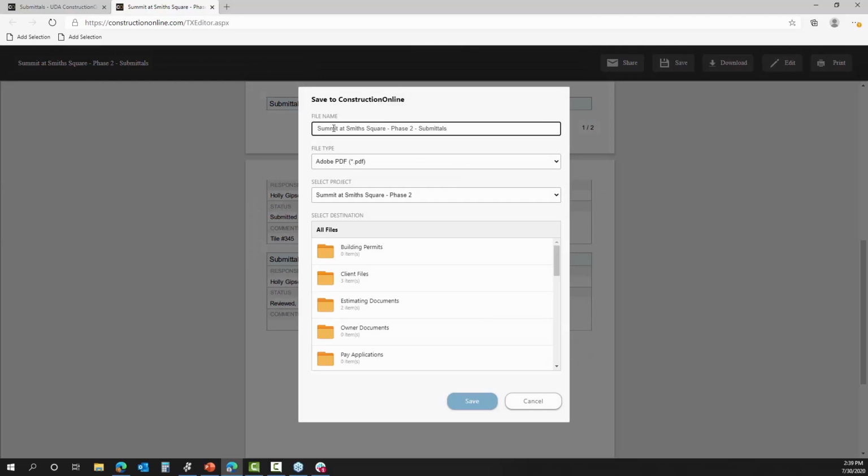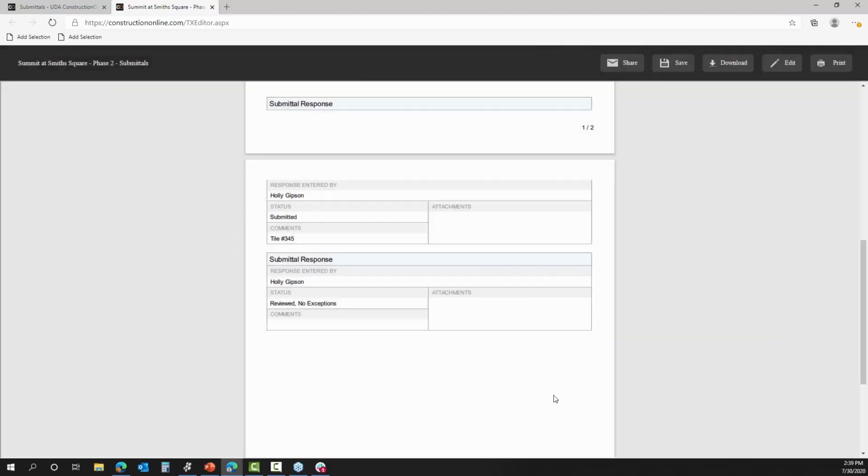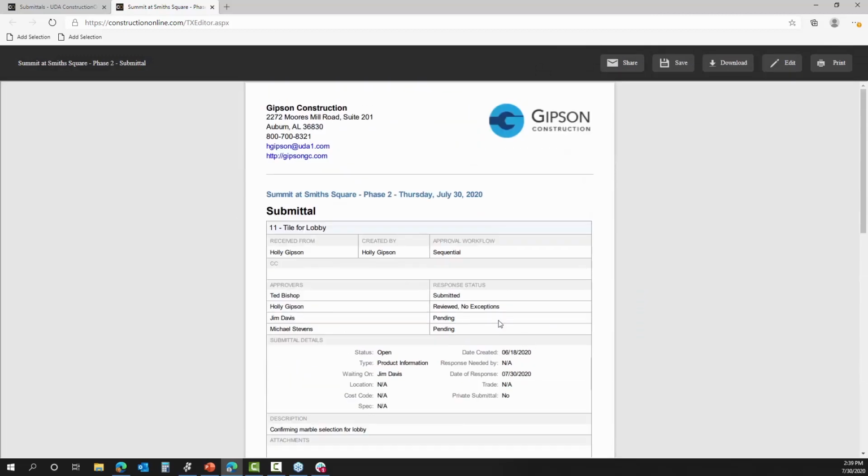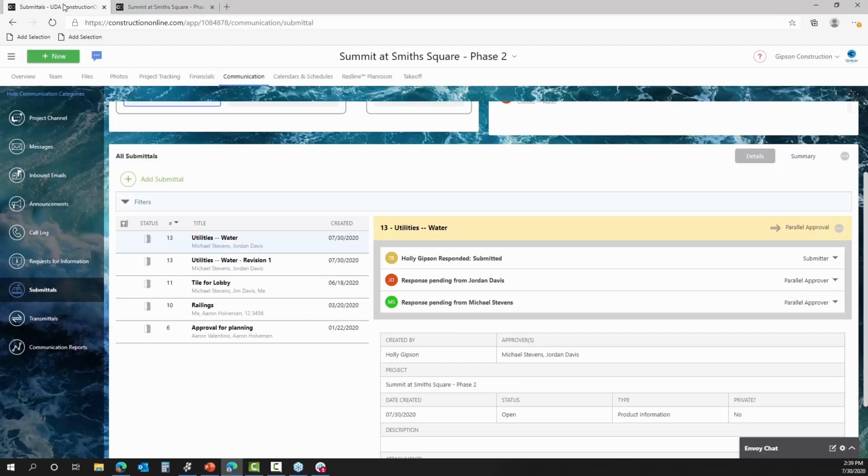And then what I've seen companies do to great effect is to use the transmittal section inside of ConstructionOnline to act as like a certified message to say, this is the final document, this is sent for your information. It's a great option to check to say, what's the purpose of this transmittal. And then they'll actually attach the ConstructionOnline file just to serve as that final message that says, we did this. We're done. That final stamp there, definitely.